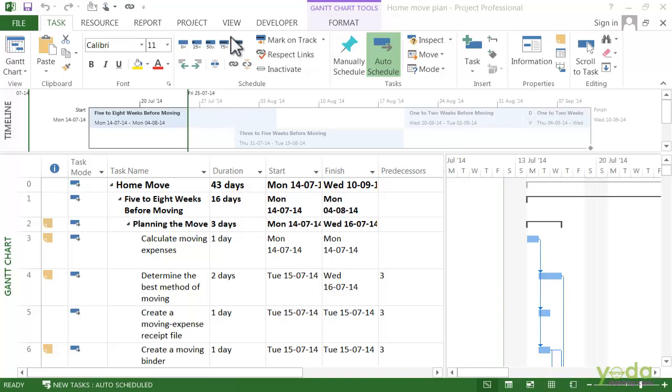One of the project's important benefits is its ability to calculate the schedule. But sometimes the task needs to occur on specific dates or have other kinds of date restrictions. While manually scheduled tasks let you set the task's start and finish dates, date constraints are another project feature that let you set the task dates with degrees of flexibility, like a task that can start no earlier or later than a specific date.